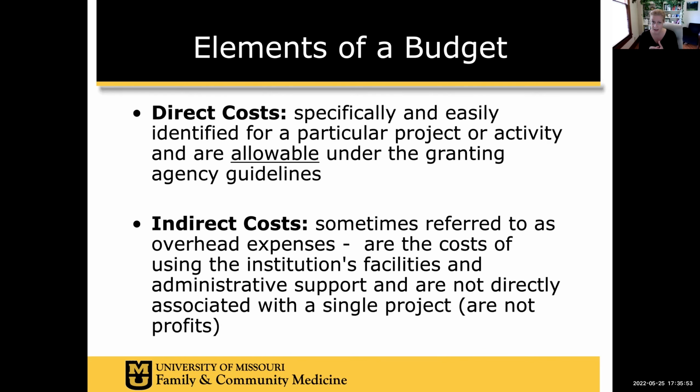So the reason I'm talking to you about indirect costs is if ever you get into a non-Tri-Council fund, you need to include these. And that then depends on the university, and they can be really huge amounts. I know that for contracts at McGill, the indirects on salary costs for RAs and that are something like 60%. So that's where you need to start looking when you look at foundations and different things, like, are indirect costs accounted for? If not, like that 50,000, does that have to include indirects? Because you're going to find out you have very little money to work with in direct costs if that's the case. How much do they allow for indirects, and does that match what your institution would require?